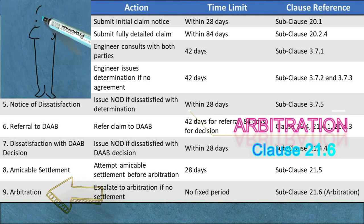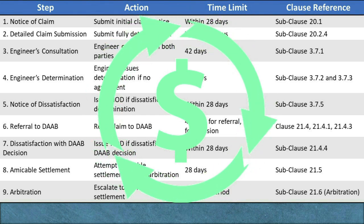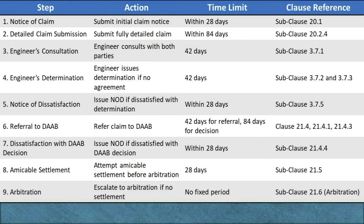Step 9: Arbitration (Subclause 21.6). Action: If amicable settlement efforts are unsuccessful, either party may escalate the dispute to international arbitration. Arbitration is conducted in accordance with the International Chamber of Commerce rules, by one or three arbitrators as agreed upon by the parties. The arbitration award is binding, final, and enforceable. If the arbitration award requires payment, the amount is due immediately without further certification or notification. The arbitrators have the authority to review any DAAB decision that is not final and binding. Clause Reference: Subclause 21.6 — Arbitration. Purpose: Arbitration offers a definitive, binding, and enforceable resolution — the final step in the dispute resolution process under the FIDIC Yellow Book 2017.